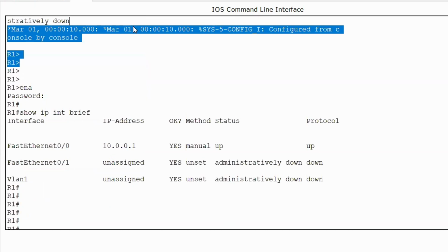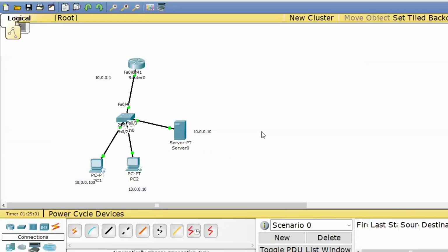All right. Anyone have any question? You can ask me. Once the device is upgraded, after that, what you need to do? You need to just take a post check. Whatever commands you used for the pre-check, the same commands will be used for the post-check, and we will match the output of the pre and post. If everything is matching, then your operation is successfully completed, and you need to check with all the teams. Hey guys, can you please verify all the things are working properly? If they confirm, then your operation is a success. Now your activity is complete. Got it? So this is the way in the production network to upgrade a device.